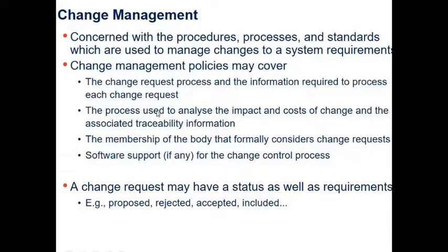They will also cover the process used to analyze the impact and costs of change and the associated traceability information, the membership of the body that formally considers change requests, and the software support, if any, for the change control process. All those are part of the change management policy.